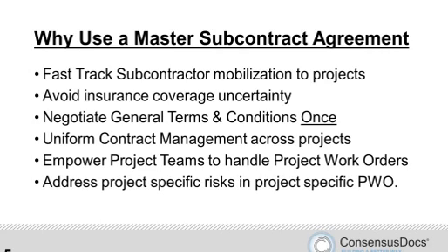With the fast track nature of construction these days, every project seems to be fast tracked. There's not a lot of time, and so you end up in that situation where project managers want to get those subcontractors out on the job site, and those subcontractors are feeling the pressure, and so you'll have people mobilizing onto a job site before the contract has been fully negotiated and signed.